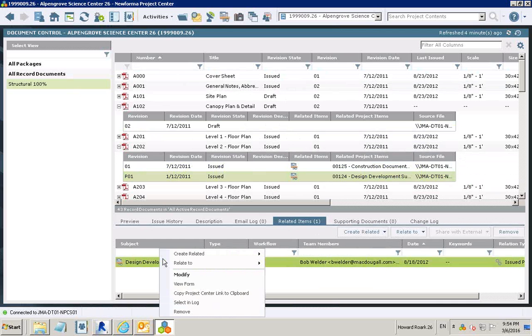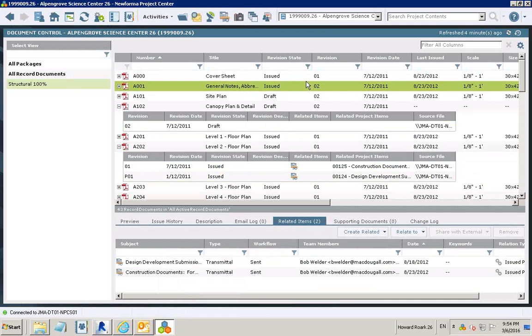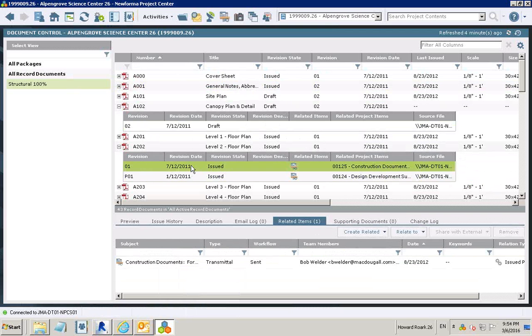Every time you do a new revision, are you suggesting that we re-PDF all the drawings and upgrade every drawing, even if we only change one? No, definitely not. That's certainly not what I'm recommending. If I'm just doing one sheet issuance and it's revision 3, I'm just going to add revision 3 and send out revision 3, and that's all that's going to be in the zip folder and in the subfolder. It'll show up on the recipient's screen as a new revision.